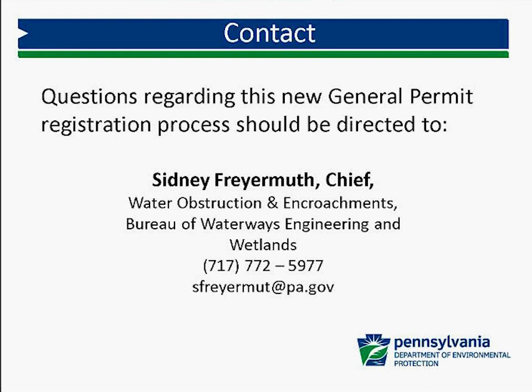Will permits currently being prepared and submitted before the new forms are enacted require new forms to be submitted? My answer to that is no. Staff will be instructed to process permits as they are submitted before March 26th. After March 26th, a new form will be required. So anything in the pipeline will be reviewed based on that information.